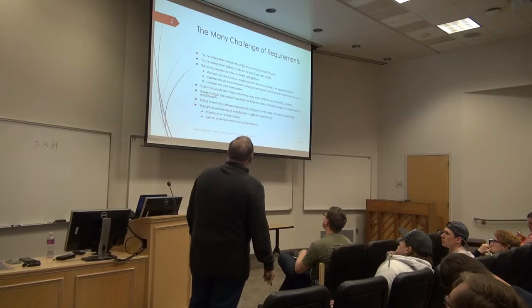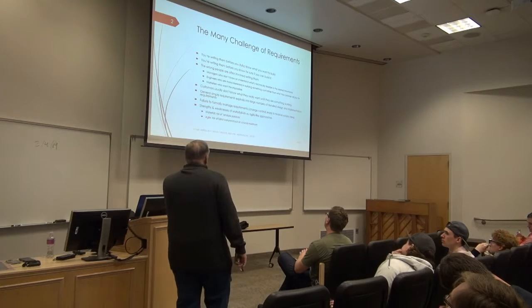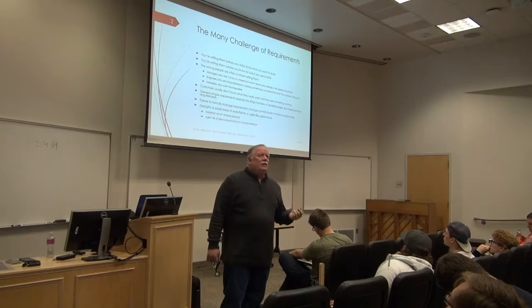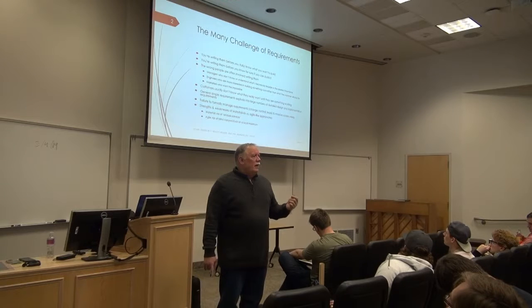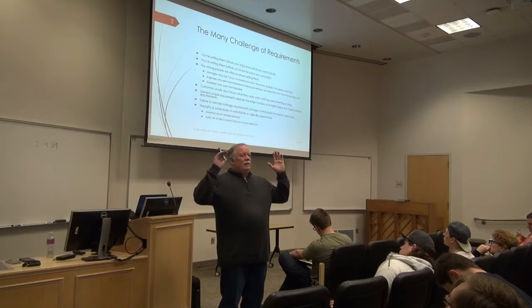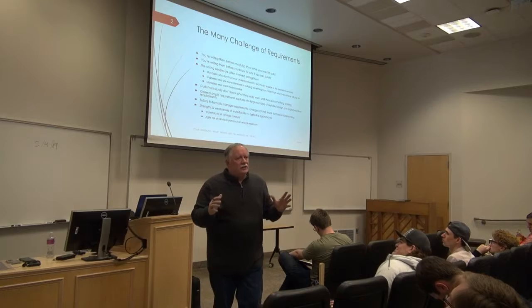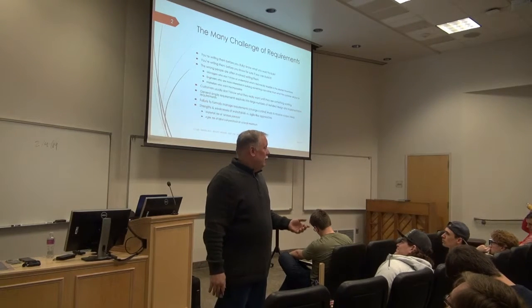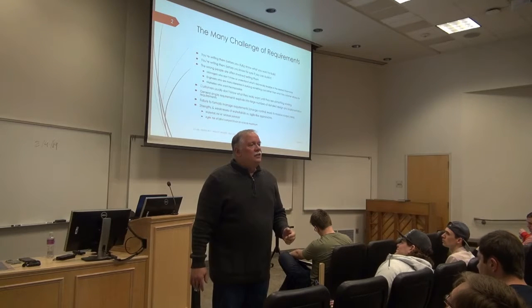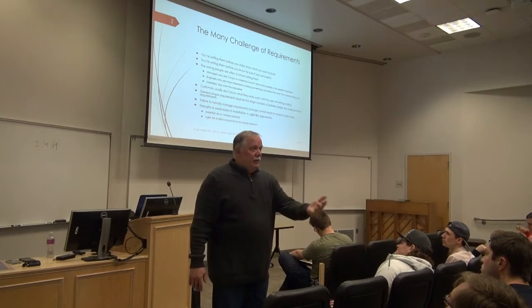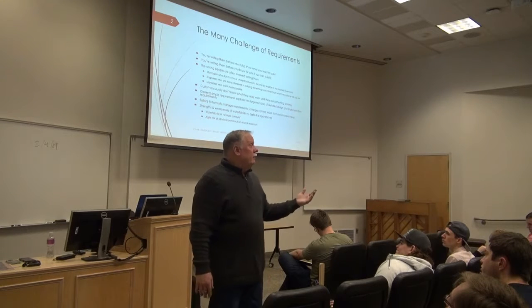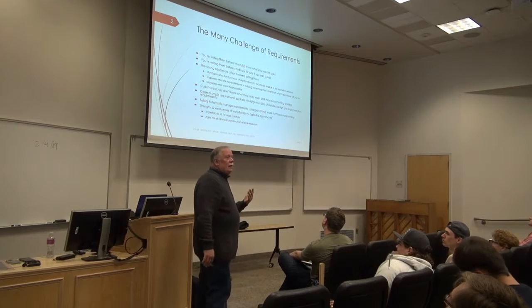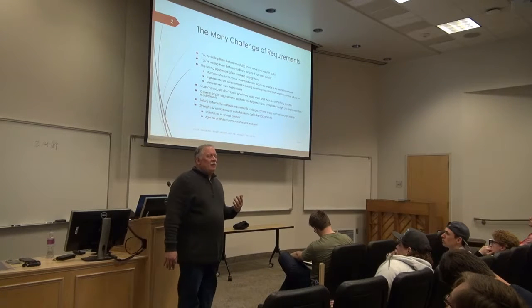Failure to formally manage requirements can lead to massive scope creep. This is a lot of the driver behind Agile and DevOps, with the idea that rather than having a rigorous change control process to say if you're adding a requirement, it has to be approved by so many people, you make the changes so small and incremental that it can be done in a week or with your DevOps operation in a day, in an hour.